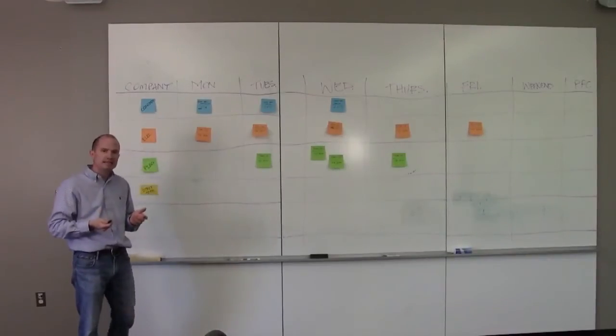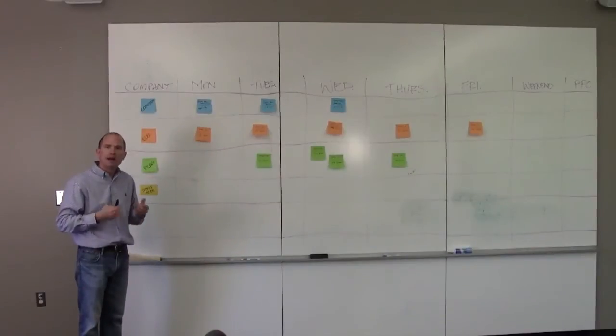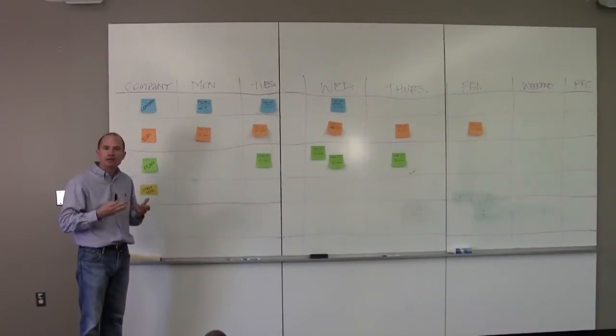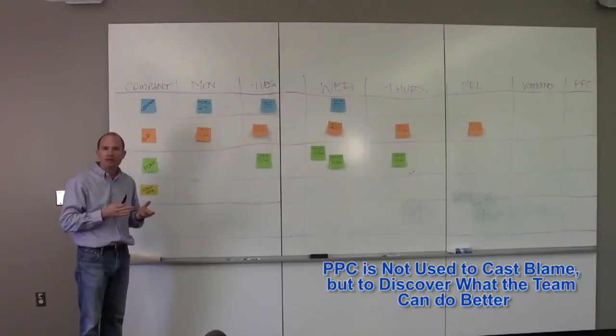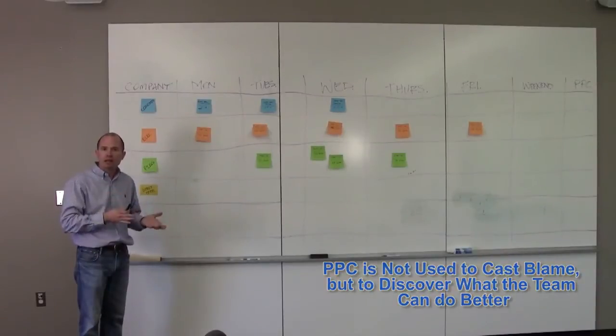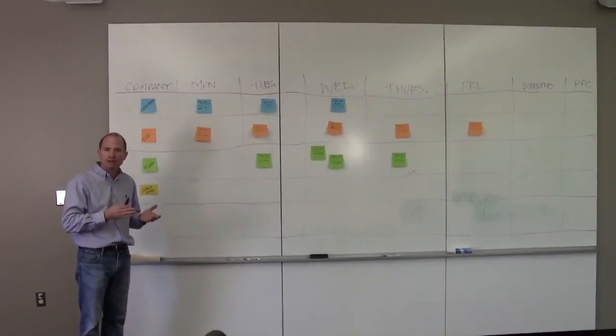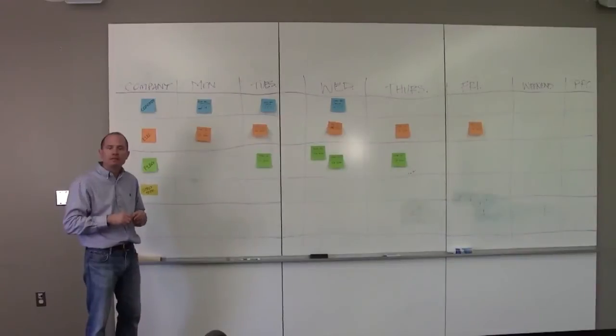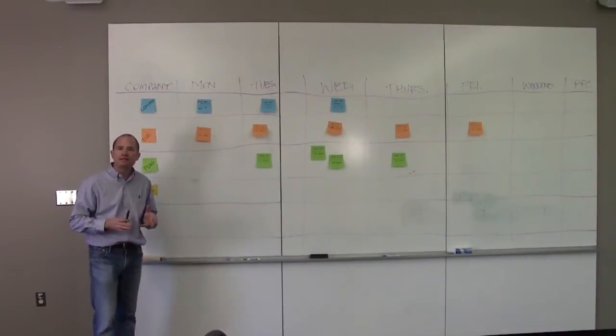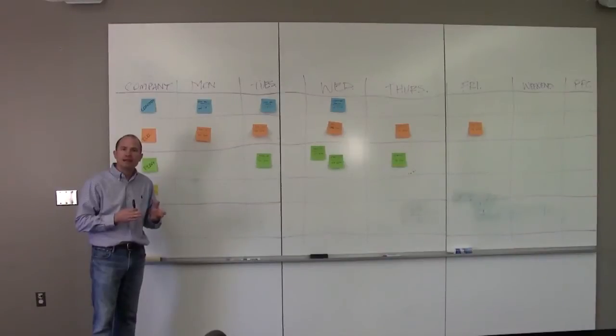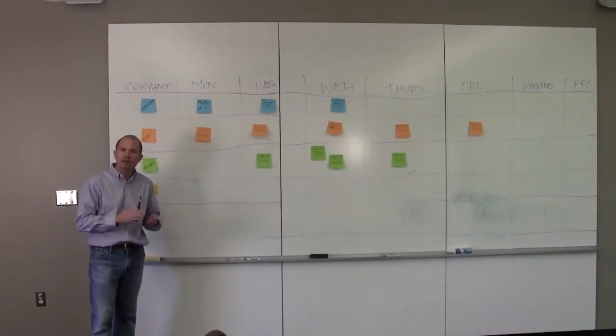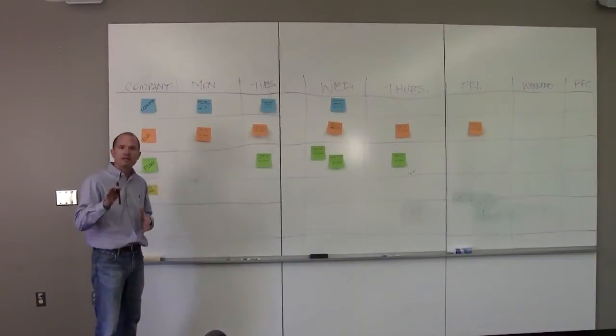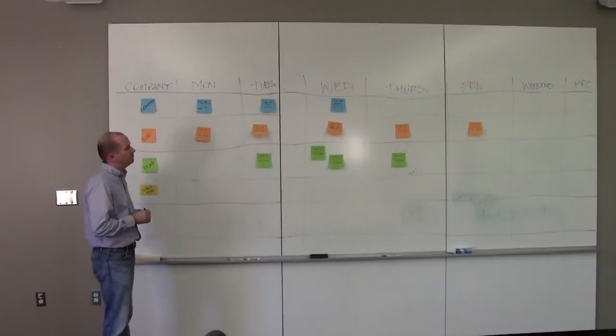Percent plan complete, PPC, is a way to track who is getting what they said they were going to do done. It is not a way to really nail the person who's struggling or cast blame on someone, but really finding out what is driving this project or this schedule. What problems are really impacting it. Because if a person can't do a lot of things and can't get a lot of things completed, it doesn't necessarily mean that they can't do that task. Maybe there's other factors or variances that are impacting them. We'll get to those in a bit, but this is percent plan complete.